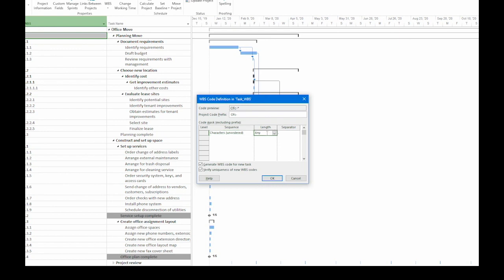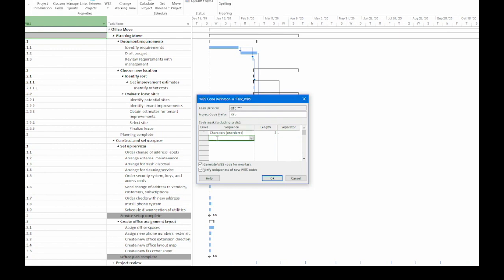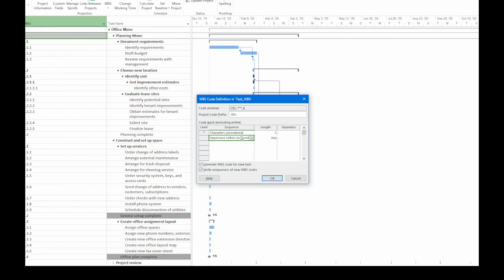I'm going to go to the length cell and instead of any, which allows any number of characters at this level, I'm going to type 3 to limit it to 3. I'm going to keep the separator as a period. If you click the down arrow, you can see that you have a couple of symbols you can use. Now let's go to the second row and click the sequence cell. In this case, I'm going to choose uppercase letters ordered. So this is going to be letters in sequence. I'm going to keep the length 3 and the separator as a period.